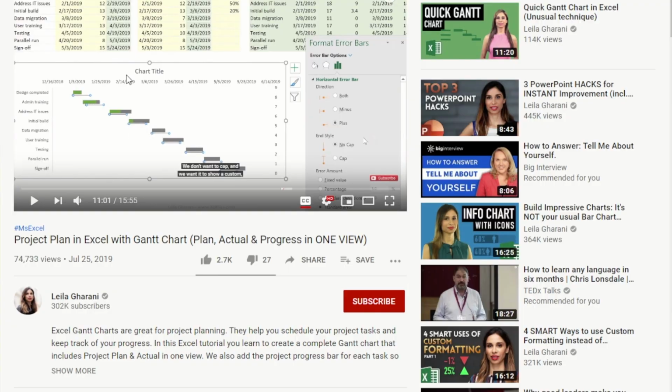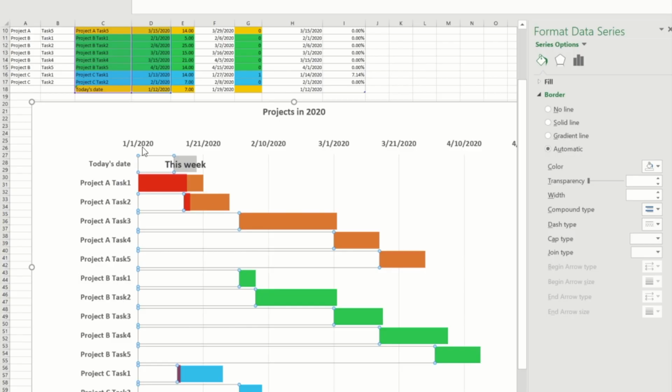This video on Excel Gantt charts is phenomenal. I have never noticed that a Gantt chart is just a stacked bar chart where you add the value of the date to the value of how many days are needed, and you choose colorless for the first bar so that it pushes the second bar as a stacked bar.